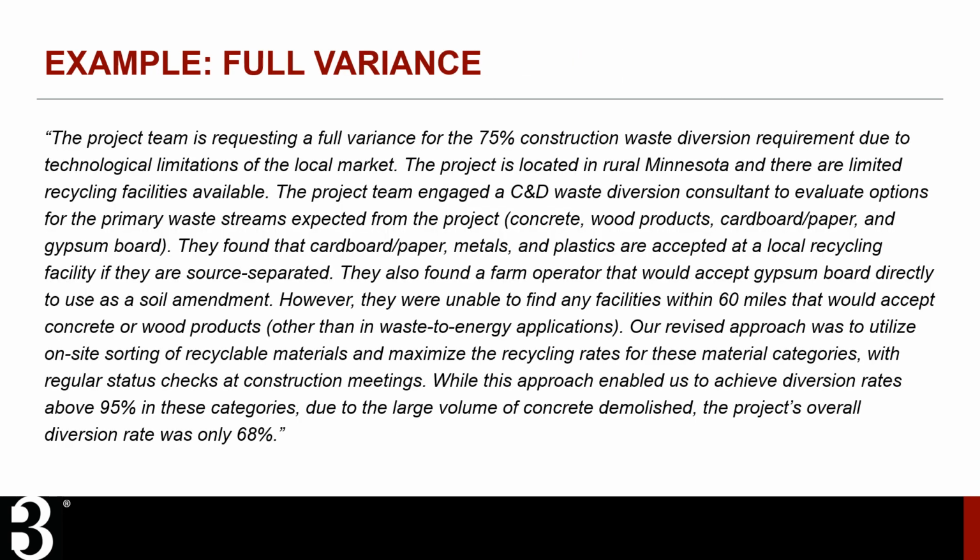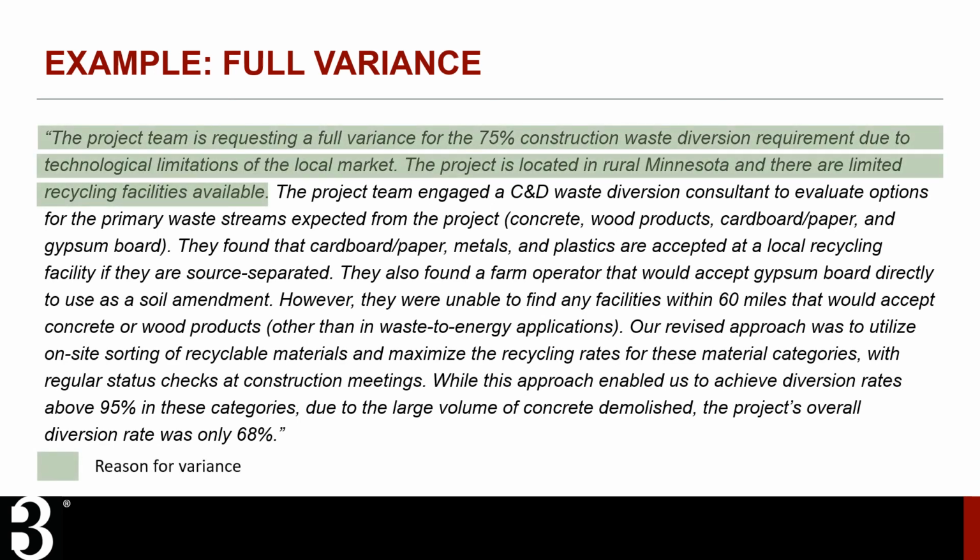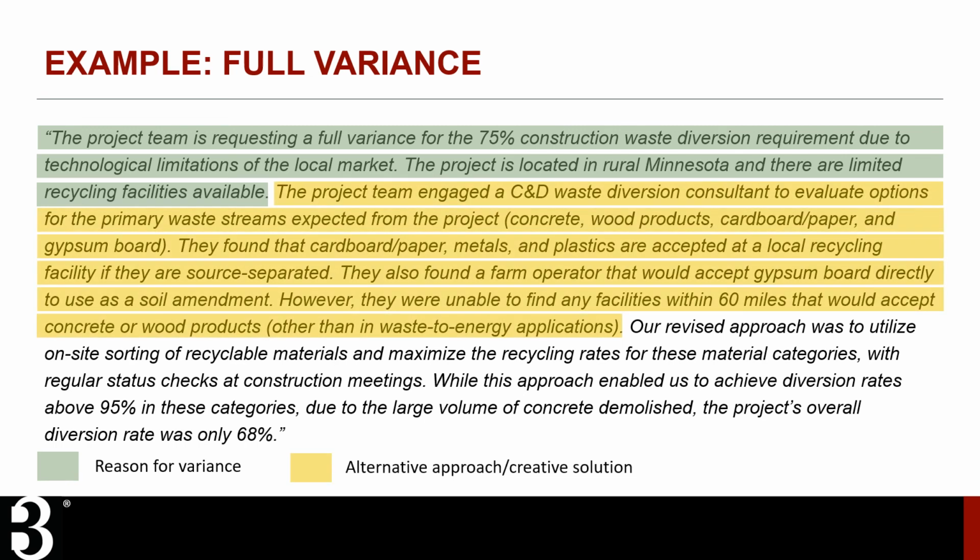Now let's look at a sample full variance. The reason the variance is needed is clearly stated. Due to the technological limitation of local markets in rural Minnesota, they cannot meet the required recycling rate. Next, they describe how they made every reasonable effort to meet the intent of the guideline, engaging a waste diversion consultant and exploring creative solutions like supplying gypsum board directly to a farm operator for use as a soil amendment.